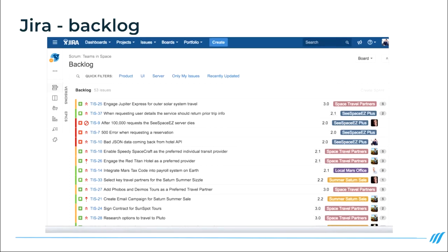So, for example, people can comment on the fact that if you combine 2 of the items further on down in the list with an item higher up in the list, you could get some efficiency because you're working perhaps in the same area of code or making similar changes. It's those sorts of efficiencies that can make a huge difference to the effectiveness of your development team with very little expense. The backlog is generally controlled by the product owner in an agile environment. He's responsible for the priority order of everything. But it's important that everything goes in here. Technical debt, bugs, everything. So everyone has a clear picture of all of the work items that need to be done in the future.